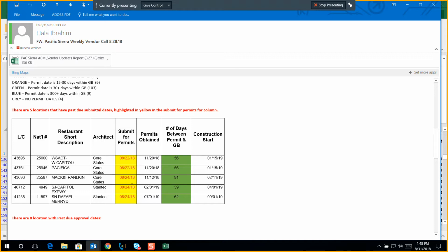That's why you see all this comes every week, and if there's any submittal missed or estimated permit date missed, then that's the first thing they start with, and you see it in the schedule, and it's all red. They want like 30 days clear between obtaining permit and start construction.